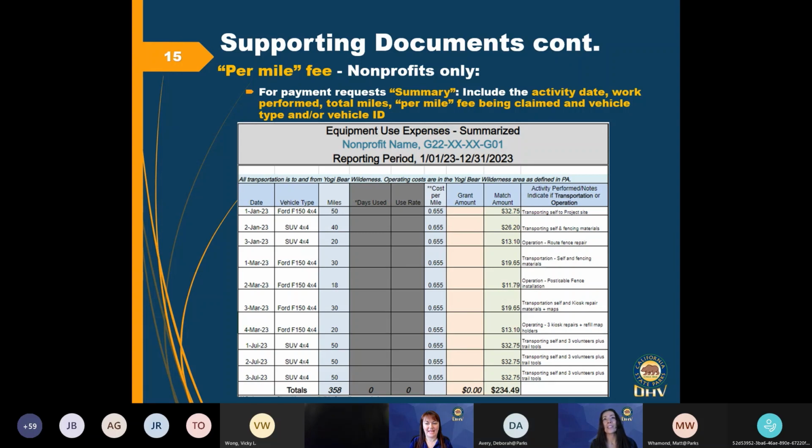As a nonprofit, can they invoice for actual vehicle costs? I was trying to think of what Robert means by that. Can you picture what type of document that would look like, Maria? As a nonprofit, can we invoice for your actual vehicle costs? So you can bill by mile, or you can assess the cost with a fee rate if the vehicle was purchased outside of the grants program. Those are the two ways that you would recover costs for your vehicle maintenance, for instance.